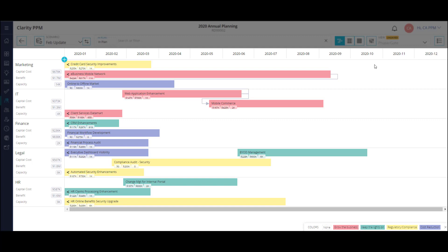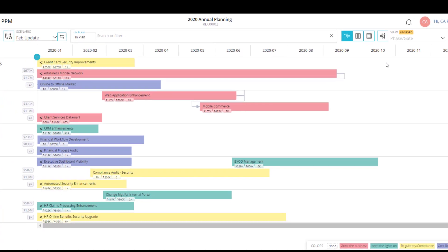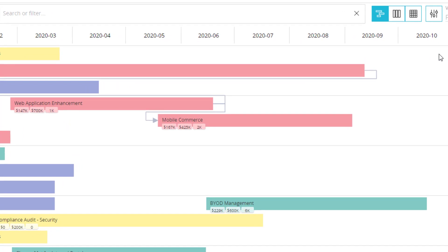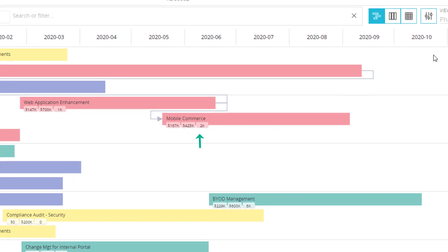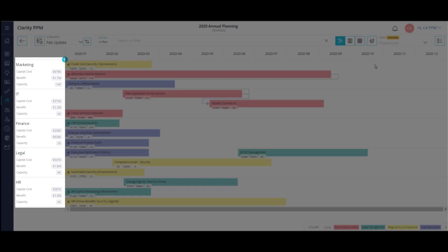These projects are divided into swim lanes based on their sponsoring organization. I'm able to see which projects roll up to marketing, IT, finance, legal, and HR. Each project has key metrics attached in the timeline view, including capital cost, benefit, and resource capacity. These metrics are also aggregated by each swim lane.